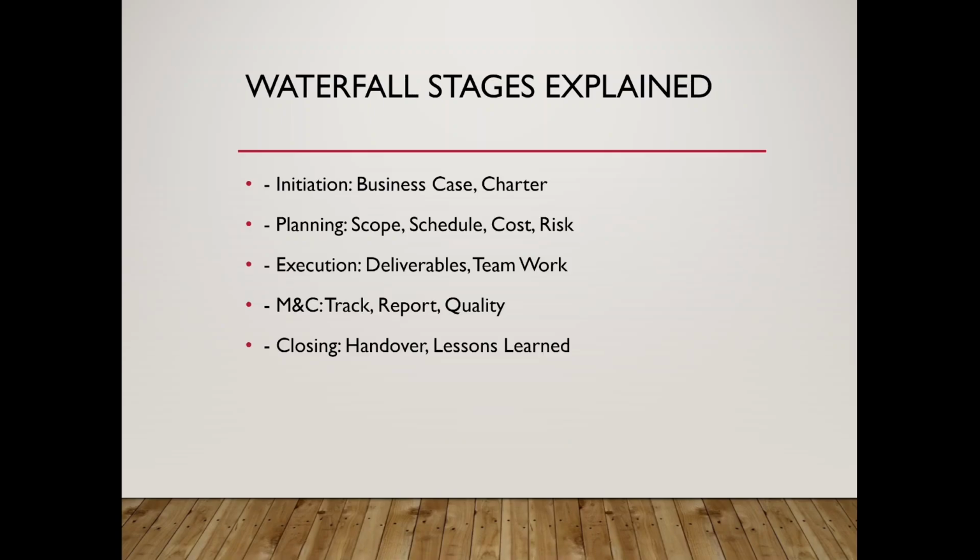Now, let me break this down further. Initiating is about the business case and the project charter. Planning is the heart of waterfall: scope, schedule, budget, risk management, and so on. Execution is where the deliverables are actually created. Monitoring and controlling happens in parallel, making sure the project stays on track. And finally, closing: hand over the deliverables, document lessons learned, and formally shut down the project.